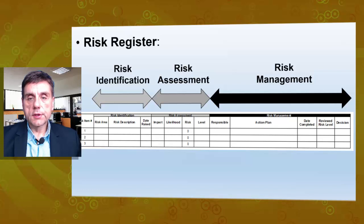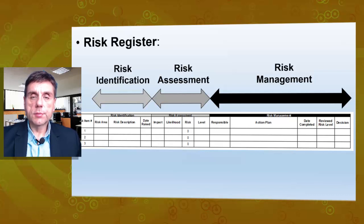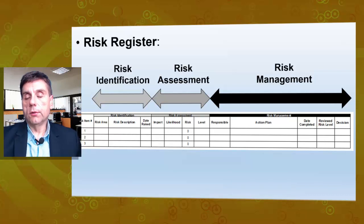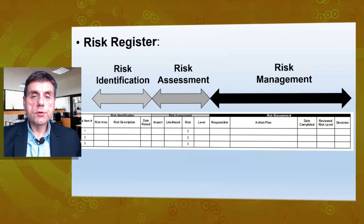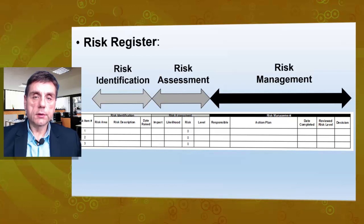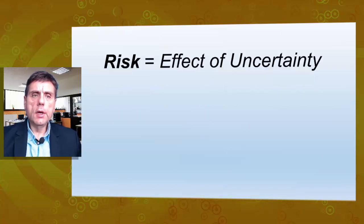In the risk management area or process, we should assign responsibility for who is going to manage the particular risk, define the action plan, the date that the action or actions would be completed, and then review the new risk level and make a decision about the particular risk.